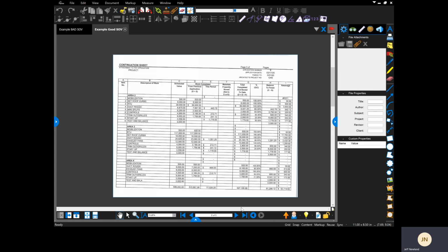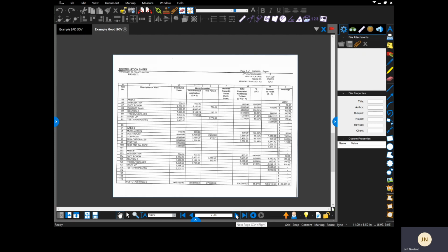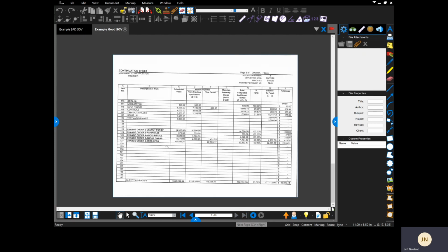It goes throughout. This one happened to be 5 pages of schedule of values. And then he would list his change orders at the end. It's important that you cannot put a change order on your schedule of values or on your pay application until it's been fully executed. And you can't bill for it until the work's been completed for that particular period.